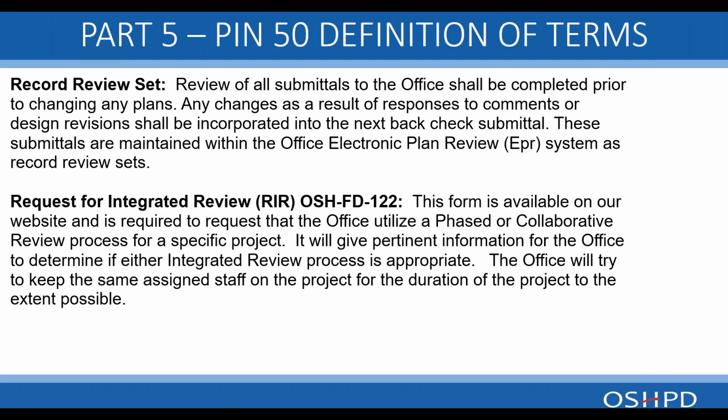So when a submittal is submitted, that submittal does not change until the review is 100% complete and sent back to the design team. Any revisions to that submittal will be incorporated in the next submittal as a back check.